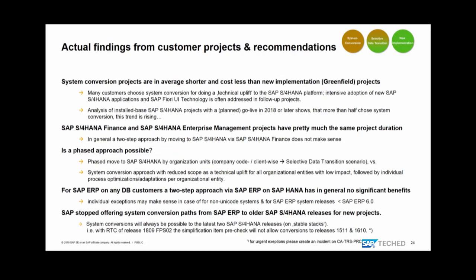Looking at some other findings: from our statistics, system conversion projects are on average shorter and cost less than new implementation projects. A lot of customers ask whether it makes sense to focus on S/4HANA Finance first and handle other things later. Based on our experience from customer projects: implementing S/4HANA Finance requires defining interfaces to logistics, HR, and other areas — an effort similar to doing a full S/4HANA implementation. If you do both stages, you end up with two huge projects with no net benefit.